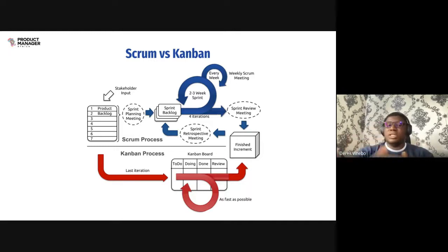And this basically means, and I'll explain it very, very easily: your team works on a number of story points for the next 2 weeks. And when they are done, you find out that, okay, initially you guys picked up 40 story points in total. They only delivered 30. The next time, if you are doing sprints, you bring in 40 story points again, they deliver 32.